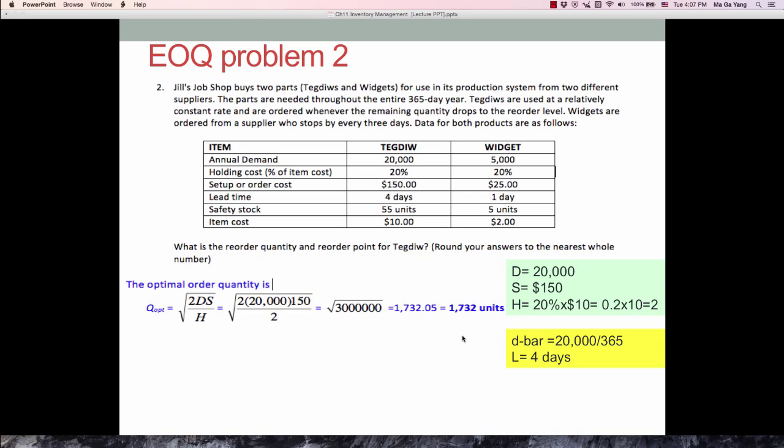And then in terms of reorder point, we have to know the D bar which is the daily demand and lead time in days. Since annual demand is 20,000 divided by 365 days, that is your daily demand. And lead time is 4 days. So our reorder point equals 20,000 divided by 365 times 4, which is 219.18. So we round down, so our answer is 219 units.